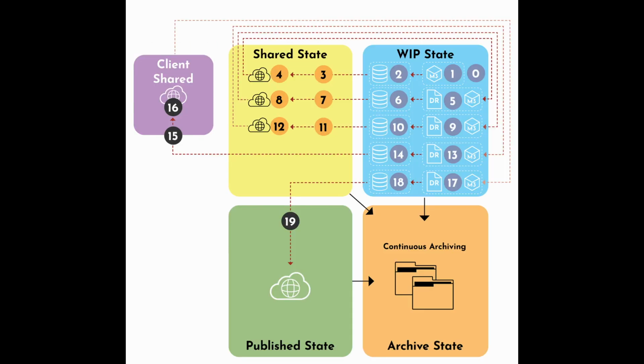5.6 Information Management Process. Collaborative Information Production. The creation of information should align with the project standards, as well as the client's methods and procedures. This also means avoiding so-called information obesity in models, which includes exceeding the required level of information need, duplications, or unnecessary details.